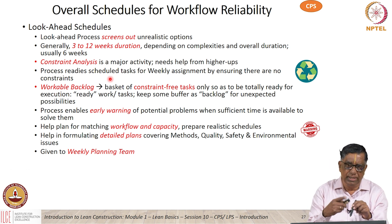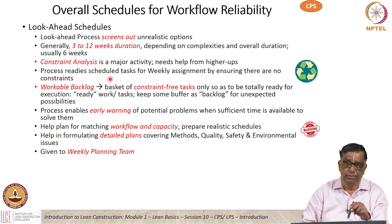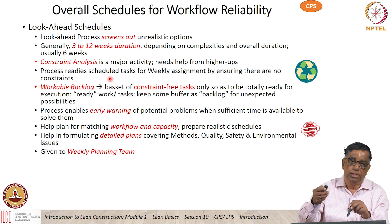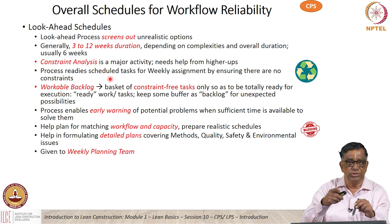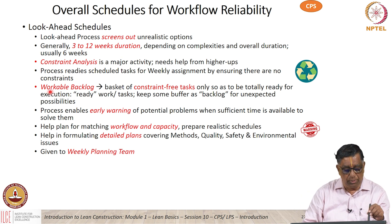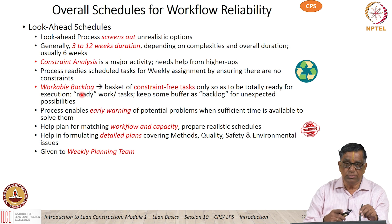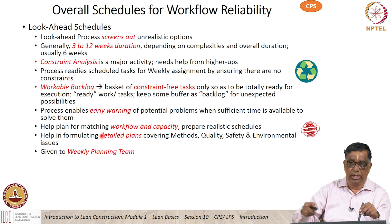I also build up a workable backlog. Suppose I plan so much work in a particular week and something goes wrong — say it starts raining and I am unable to do underground activities. The labor cannot sit idle, so I must have contingency items planned which I can execute in that particular week. That is called a workable backlog. In the look-ahead planning, I also create a workable backlog for the various weeks, with detailed plans developed over the look-ahead window.